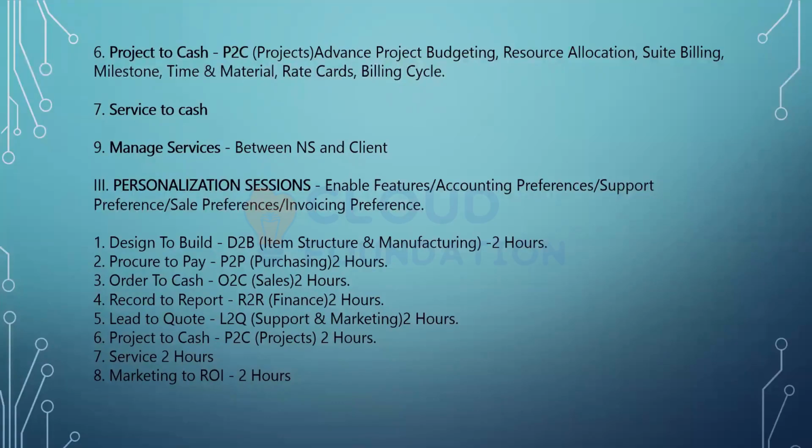Milestones are certain activities which are defined. We were talking about the NetSuite implementation itself, the enable, engage, convert phases. Each phase is defined as a milestone, and after the end of each milestone, the customer invoicing is done. And then we have the rate cards and billing cycles.